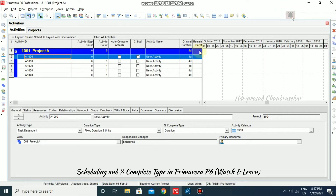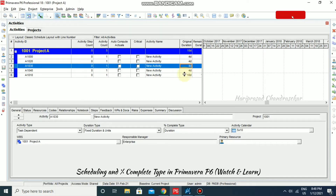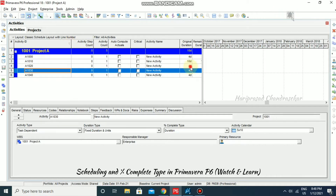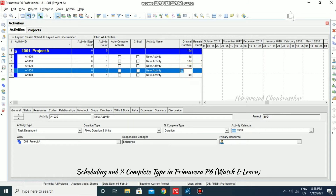By default, the activity comes with a four-day duration. If you want more, you can change it. For this activity I'm going to put in 10 days. You can click the dropdown arrow to keep it in the same sequence. For this one I'm putting 15, and this one I'm putting 5.